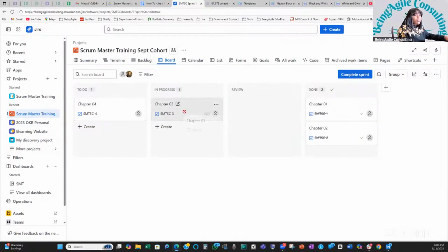So before we come to Tuesday class, this is the kind of update I like. This is how I like your board to look. Your chapter 3 should be in the review column. Then when we come, we'll review chapter 3, and once everything is good, we move it to done. And then you pull chapter 4 and bring it in progress. So this is the current state of the progress we've made in this Scrum Master project so far.